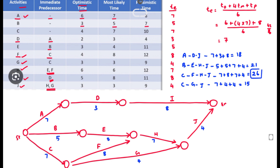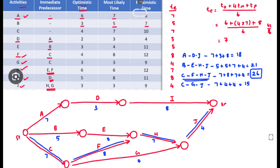The path containing the maximum duration is 26. This is the project duration, and this path — C–F–H–J — is the critical path. Now we can draw it in double line: C, then F, then H, then J.